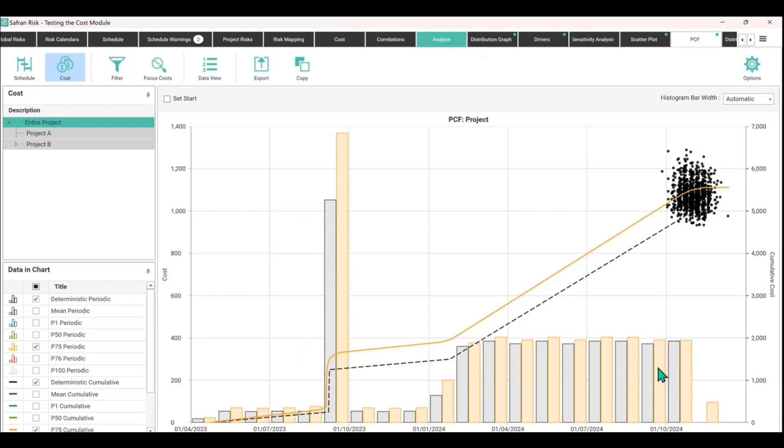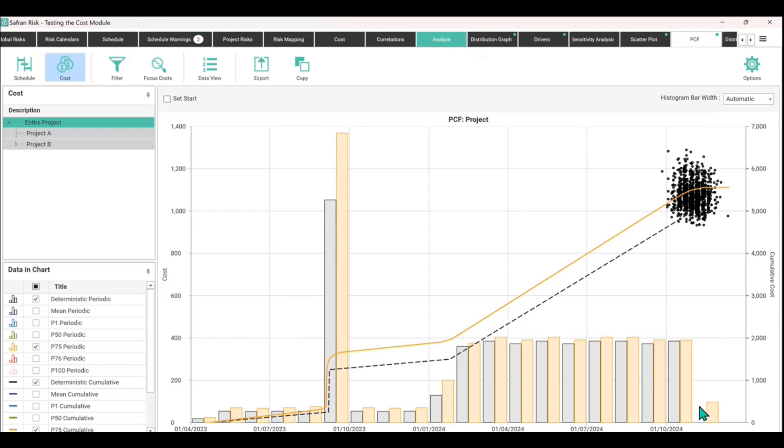But what you can also see is if we look over here, there's a period where there is no gray bar. So there are some instances in the simulation where there is delay and prolongation beyond the point at which we were expecting the project to finish.